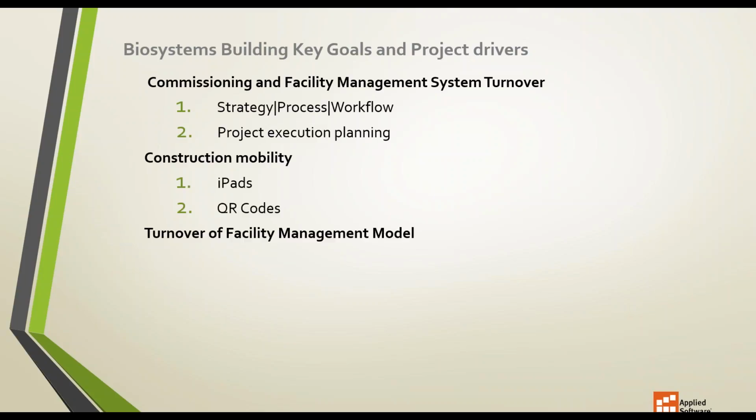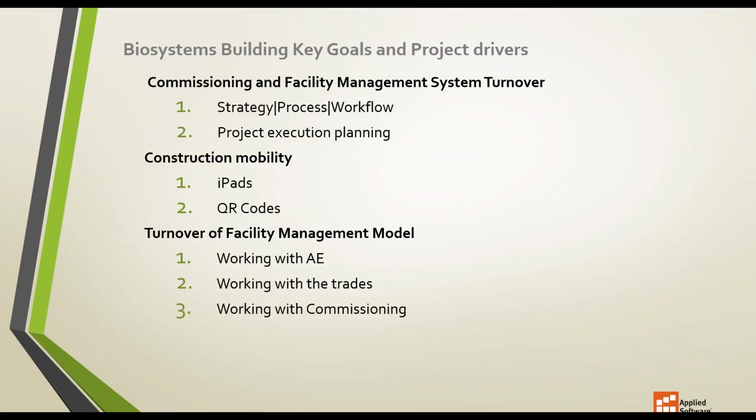And we focused on turnover of the facility management model, working with the architects and engineers, working with the trades, with commissioning, and focusing on data validation. And the owner deliverable was handover of the BIM and COBie data.